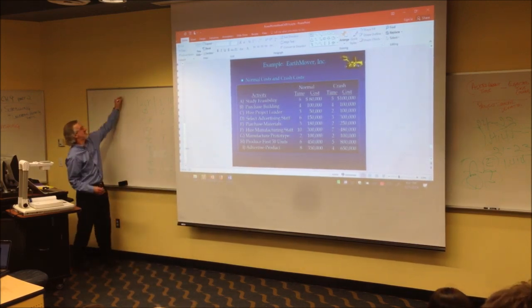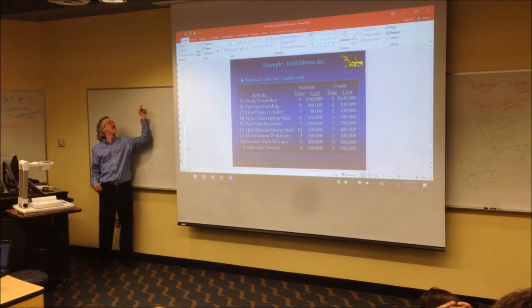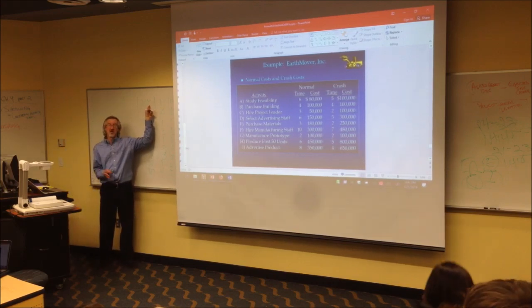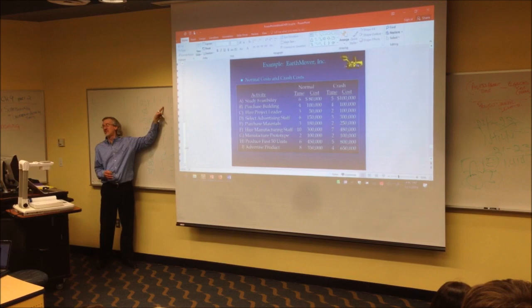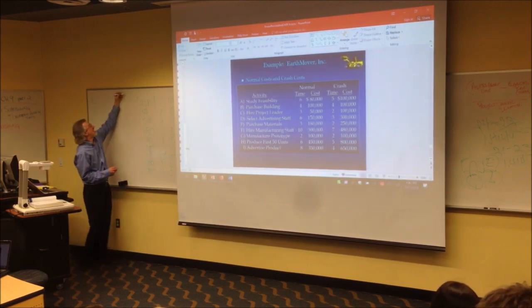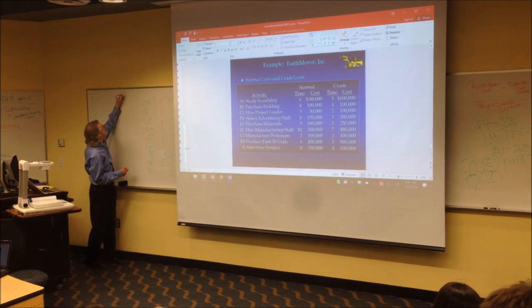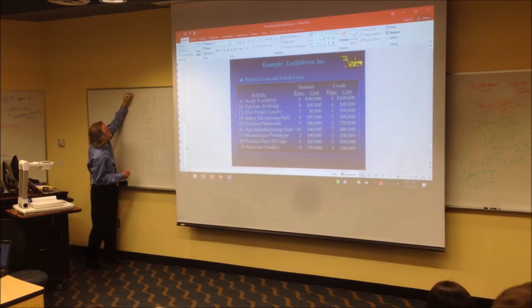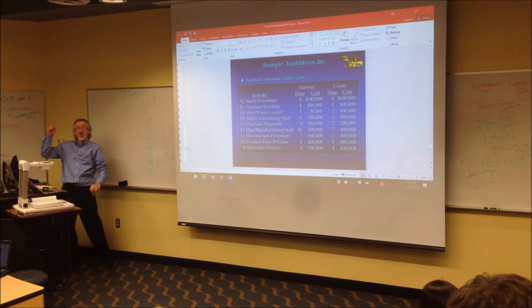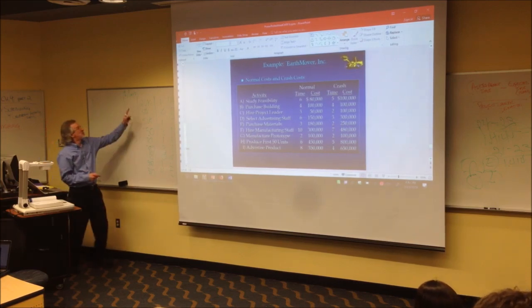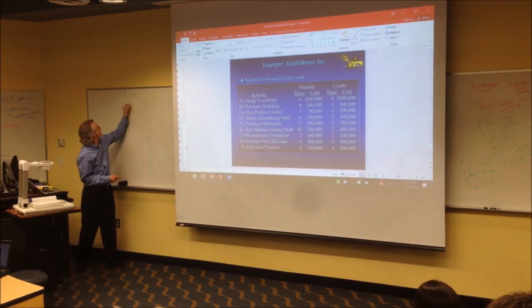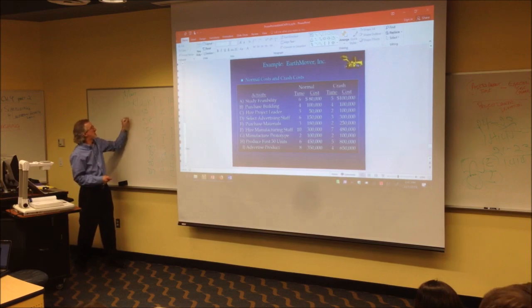All right, now, last step. We have to take the total money, the total amount of money it costs, divided by the total number of units of time we would save, because this is what we have to have, is cost per unit of time. The cost for 1 unit of time. 20,000 divided by 1 is 20,000. 0 divided by 0 is 0.